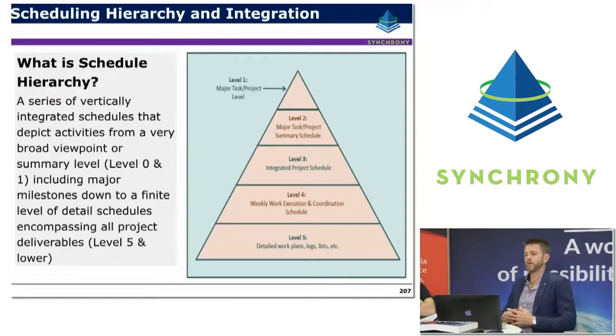Okay, so the schedule is basically a hierarchical structure similar to the WBS that we described earlier, except that the schedule goes down into a lot more detail and includes a lot of logical links that can span and cut across different WBS elements. So a schedule hierarchy is basically this vertically integrated set of schedules that depict activities at different levels of detail.